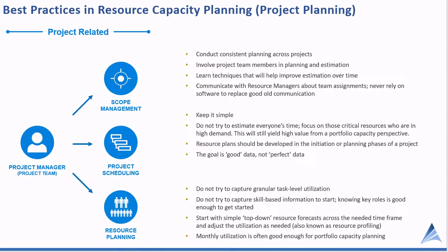Teams often like to track skill sets, which we'd agree with. But when you're getting started, trying to do skill-based resource planning can be very difficult to roll up at the capacity and portfolio level. That doesn't mean you don't track skills, but doing it from a resource planning and capacity planning perspective is difficult. We'd encourage you to start with role-based planning: I need a project manager, a business analyst, maybe developers. In general, there are a lot of roles where you can get good information based on role alone. Top-down is good enough. Monthly utilization is often the right time span for resource planning.